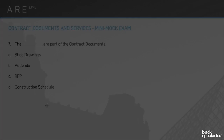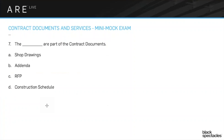Question seven: the blank are part of the contract documents. The answer is B — the addenda. The addenda are part of the contract documents. Why not shop drawings? Shop drawings are produced by all sorts of other people. They may be part of the overall project, but they are not part of your contract and not part of the contract documents you have prepared for the contractor.